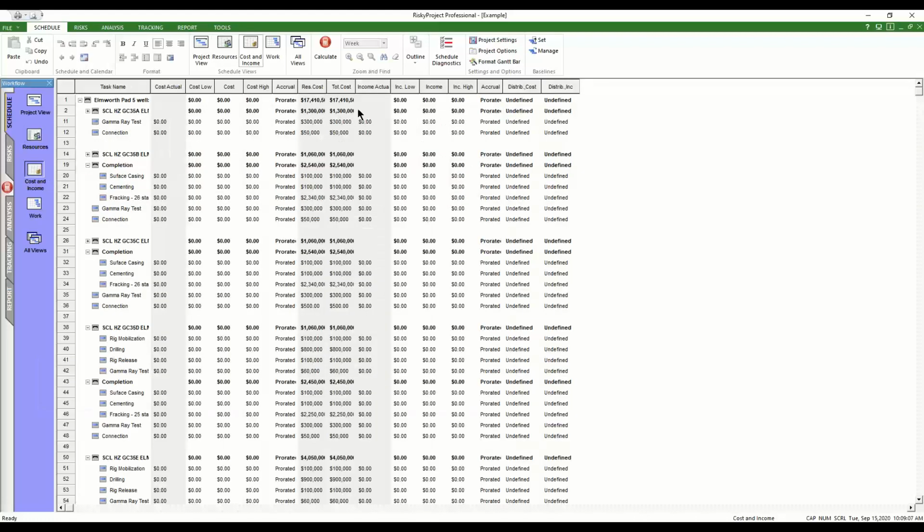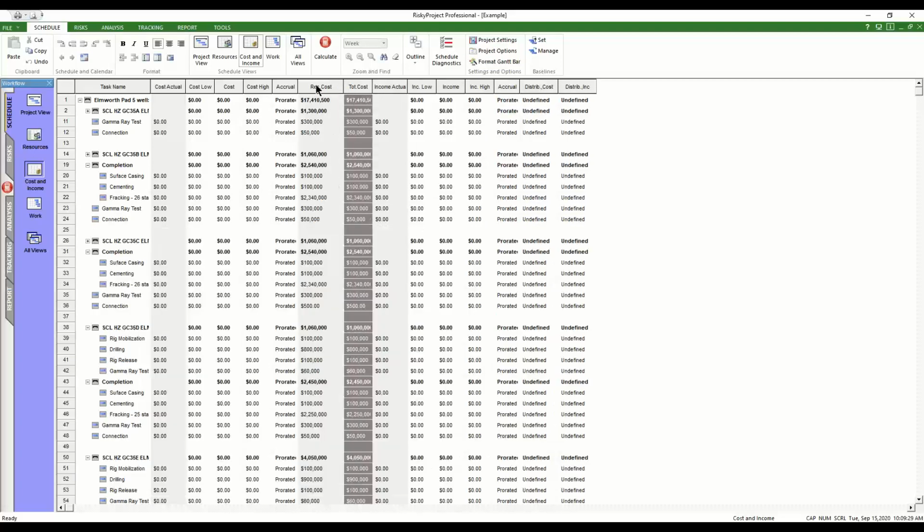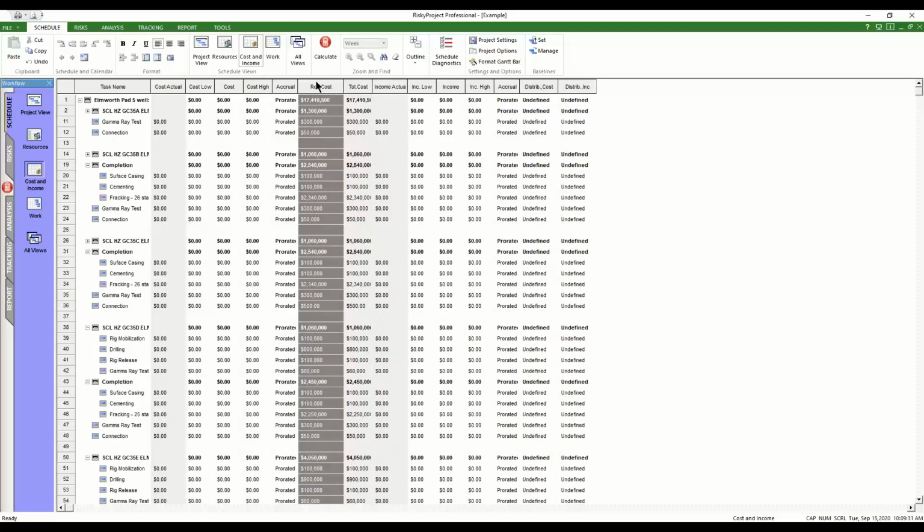If you wanted to, you could bring in fixed costs, what we call time independent costs. They're not dependent upon the schedule. So sometimes material costs will come in there, and you can put them in here, and you could risk them as well. We don't have it in this file, but it is a possibility if you're going to run an integrated cost and schedule risk analysis. And what we're seeing right here is our resource cost, and it all automatically calculates that.